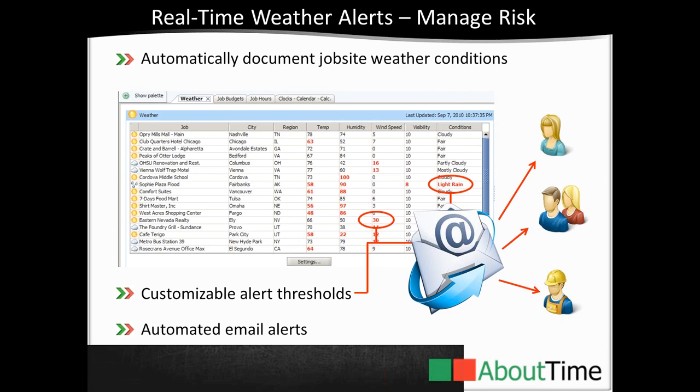Over cracked or settling cement. And again, at that time, it was very difficult to go look up in an almanac and find out. There are some better tools now that I can look back and find historical weather. But if I could get a GPS stamp with the time and date and a photo of when I showed up and what I was doing when I poured this job, and then 8 months later, you get a notice that somebody wants me to go replace their cement, and they're going to take me to court if I don't do it, because I poured in unfavorable conditions, I could validate that immediately.